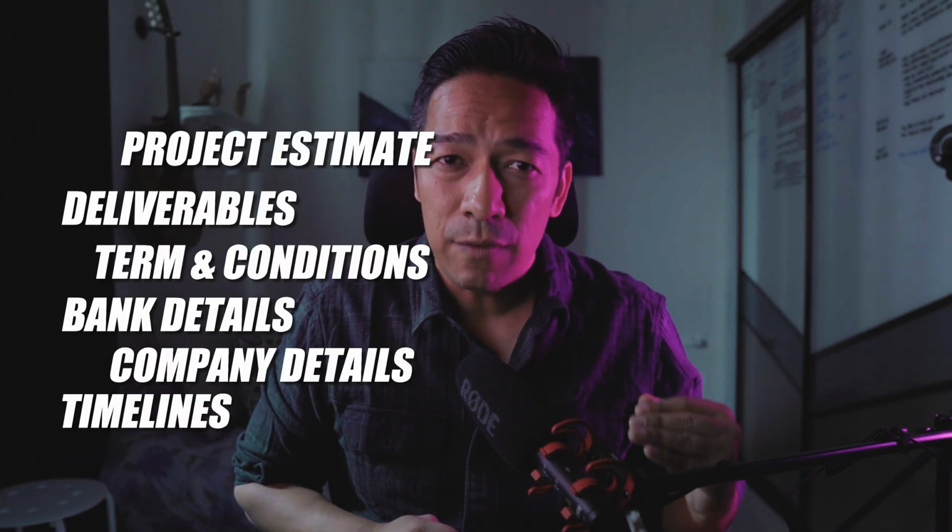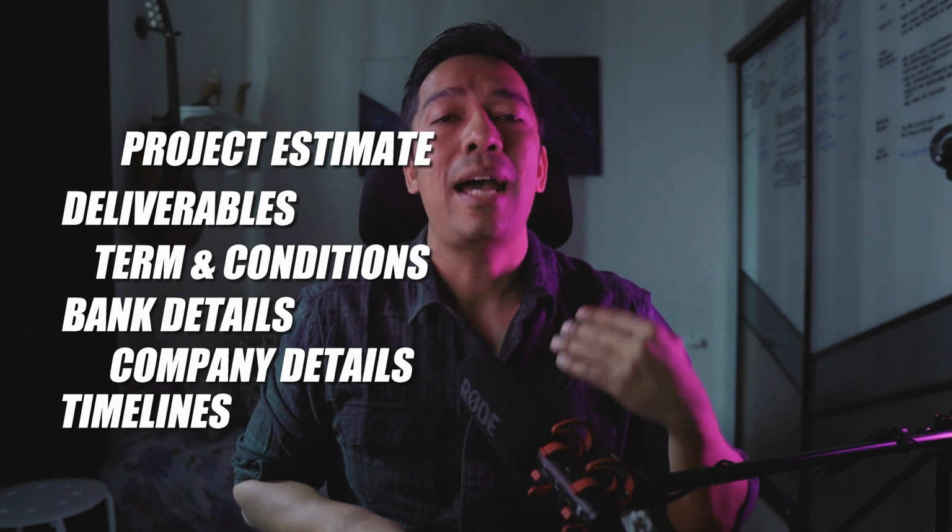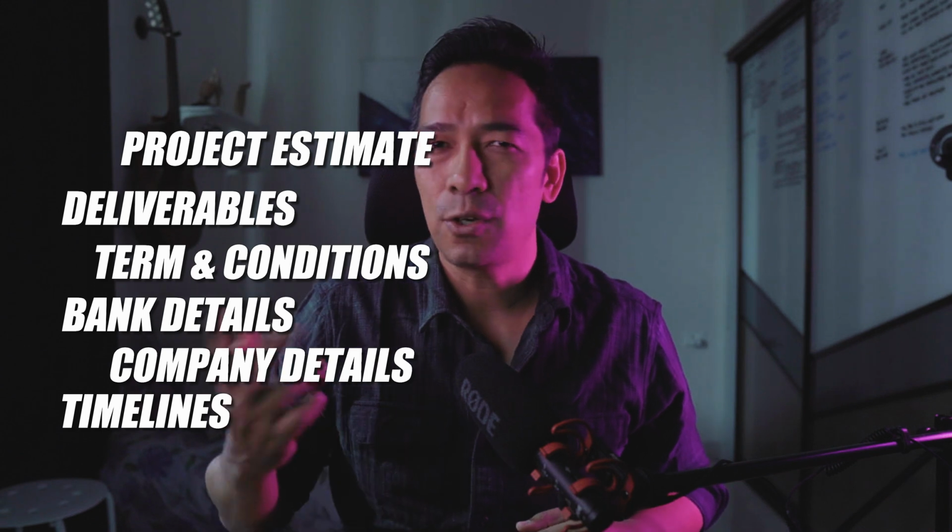So how it goes is, once the project is decided and understood upon, the freelancer should send in a pro forma invoice. A pro forma invoice is where the entire estimate of your work is mentioned, the details of the entire payment structure, your work deliverables, the deadlines, everything is mentioned in that, including the terms and conditions like your advance payment, your 30% next payment, and your 20% payment at the end. All these are to be mentioned in a pro forma invoice. Once that pro forma invoice is sent, the client will then work upon raising a purchase order.